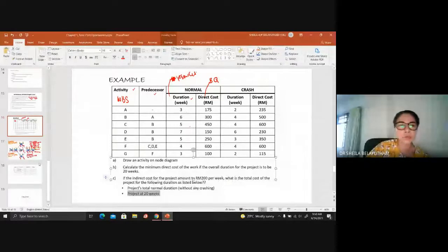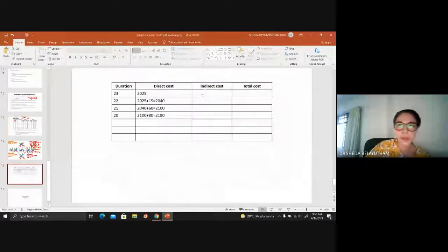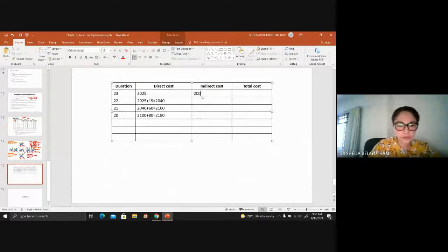Hence your indirect cost here will be 200 times 23, 200 times 22, 200 times 21, and 200 times 20.